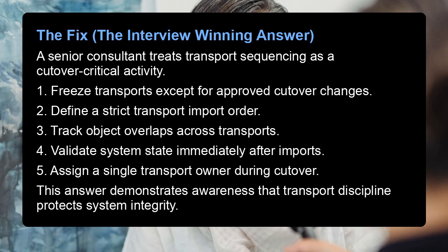A senior consultant treats transport sequencing as a cut-over critical activity. 1. Freeze transports except for approved cut-over changes. 2. Define a strict transport import order. 3. Track object overlaps across transports. 4. Validate system state immediately after imports. 5. Assign a single transport owner during cutover.